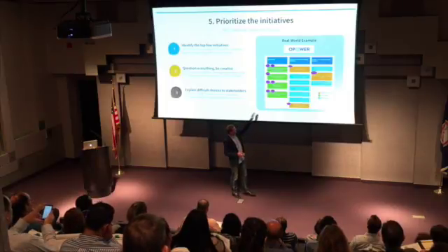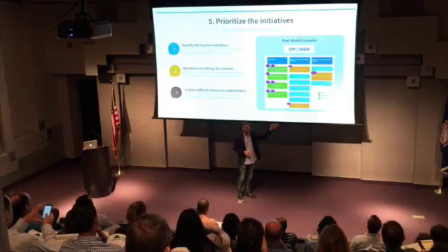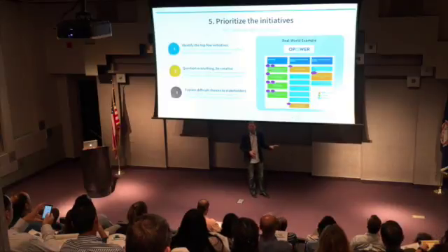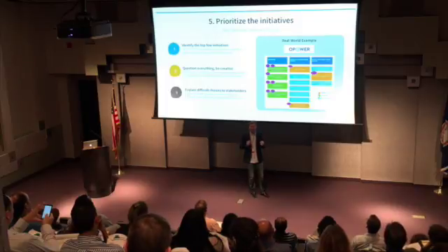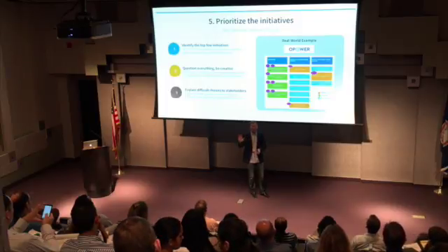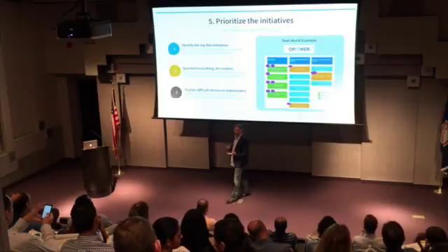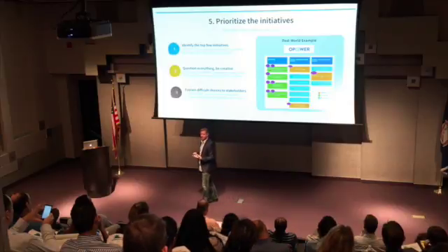But here's an example where the UX team, as a follow-up to their definition of where the gaps were within the product, said, okay, here are things that we see that are on the roadmap and things that are not on the roadmap that need to be put on the roadmap, right? So if there's something that you're already working on and you're thinking about moving things around, make sure you don't move these things because they're really important to us. And for these other ones that are not on the roadmap, here are the ideas that we have. So this is product management and UX working together to figure out what those new initiatives should actually be.